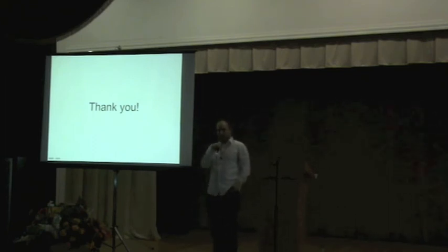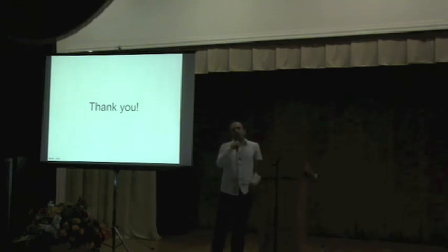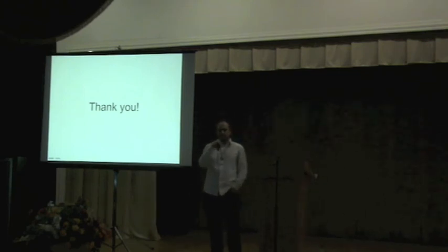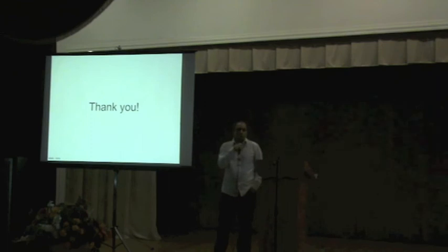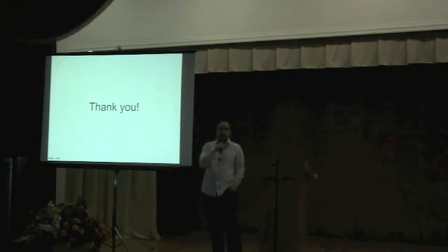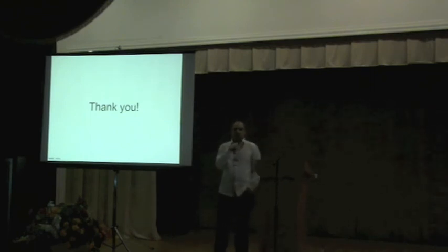The other thing is story points. In each project we have reference stories. For example, two story points, this is this little story. 8 story points, this is a bigger one. 16 points, this is something even bigger than that. And this helps to think about complexity, not how much time it will take. And I don't know why, it just works quite well. So just try it. Try one thing, try one other thing. Maybe you're better at estimating the hours than we are, and that will be just great.